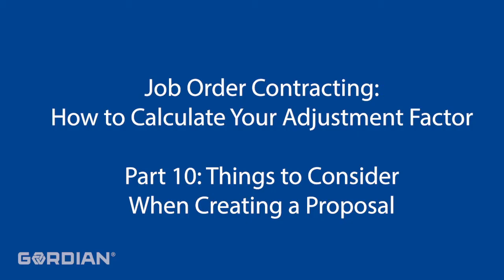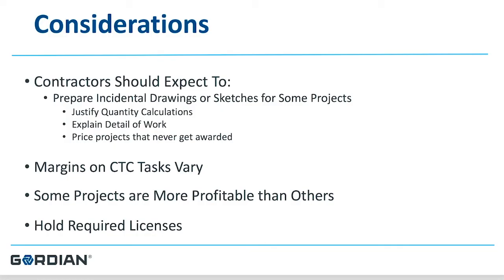Contractors can expect during the life of the contract that they may prepare incidental drawings or sketches to be submitted along with each proposal — think about that expense as you calculate your factor. During the proposal review process, sitting down with the owner to discuss an individual proposal, you may have to justify quantities, explain your math, and explain why you've used certain line items. Remember you are building a long-term relationship with your owner. You are showing the owner exactly which carpet you've put in the proposal and what the quantity is. Bear in mind that the margins on some items in the price book will be to your advantage and some to the owner's advantage.